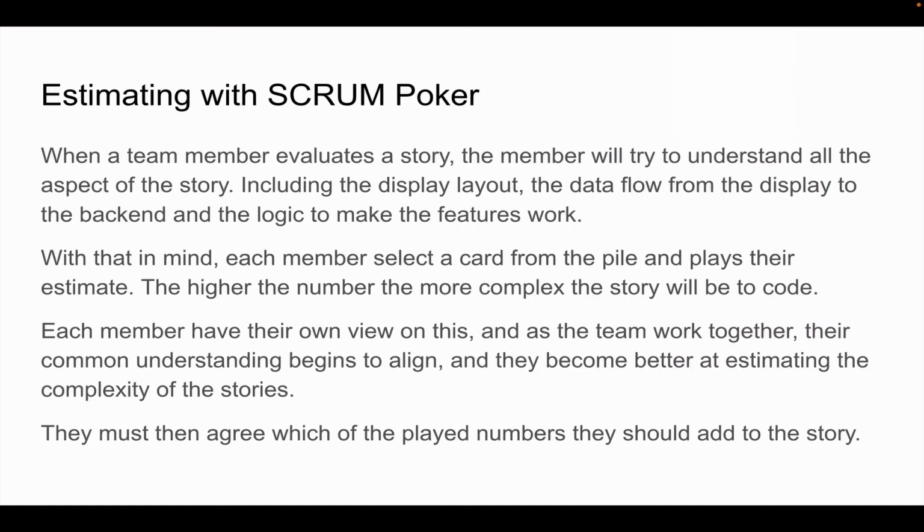When the team member evaluates a story, the member will try to understand all the aspects of this story, including the display layout, the data flow, the display to the back end, and the logic to make these features work. So with that in mind, each member selects a card from the pile and plays their estimate, and the higher the number, the more complex the story will be to code.